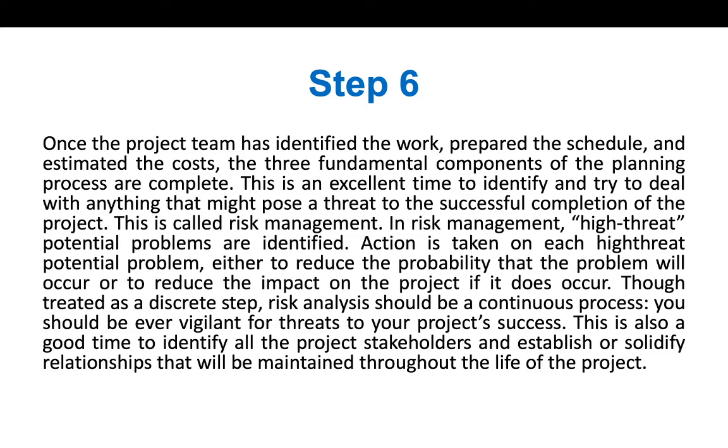We know that rain will be there, so we will do some type of indoor task in those days so that our time will be saved. When the rain stops, we will do outside work. Or if the roads are an issue, for supply chain, we will ask the supplier to send us the goods before the rain or before that period, so that it will save our time. So this is one type of risk.